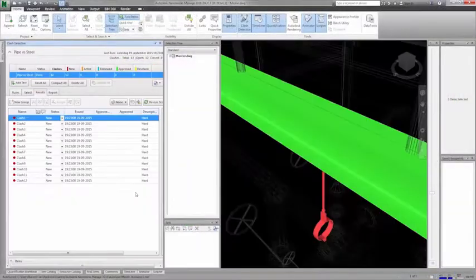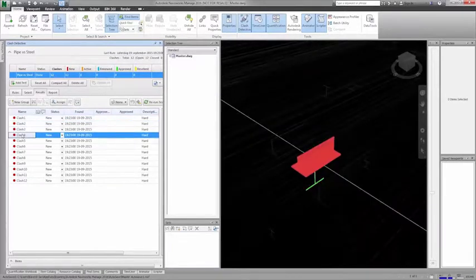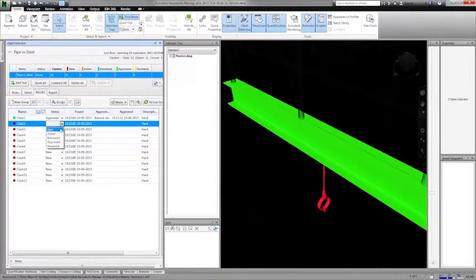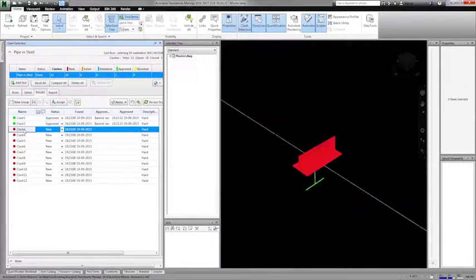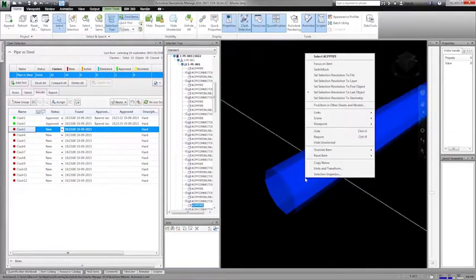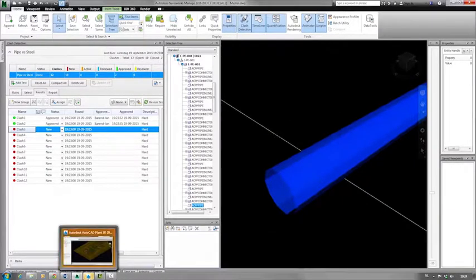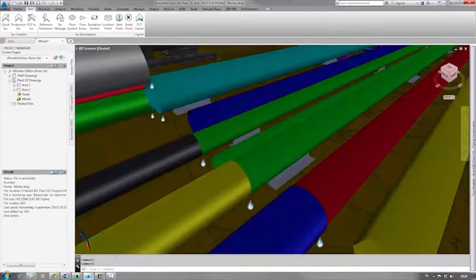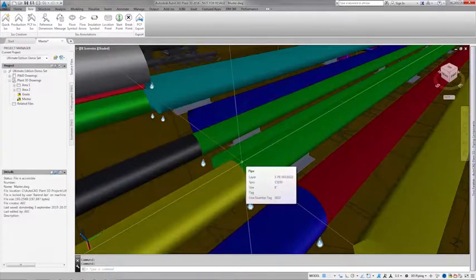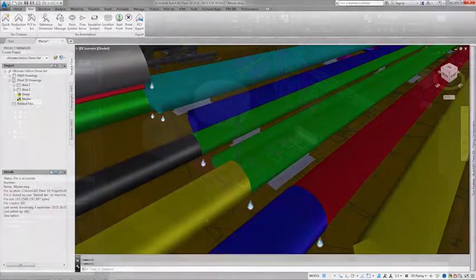As the design progresses, design teams need to review the fully integrated model and check for physical interferences, as well as soft clashes, such as clear access to valve operators and safety equipment. Navisworks Manage allows the project team to collaborate closely and identify these clashes to determine resolution.